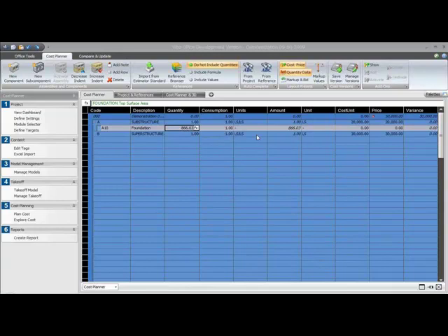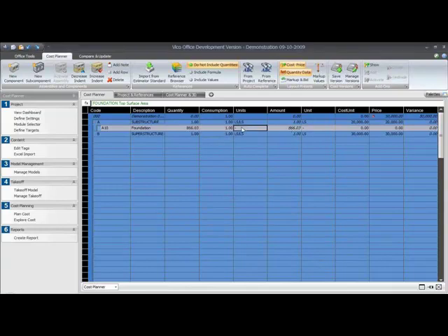The consumption is 1, which results in an amount of 1. And the units that we're using there is square foot per square foot. And we have one more unit there, which is the unit or amount unit. And the cost per unit that we're going to use is, let's say, $3. Let's make that 30 to make it work well.